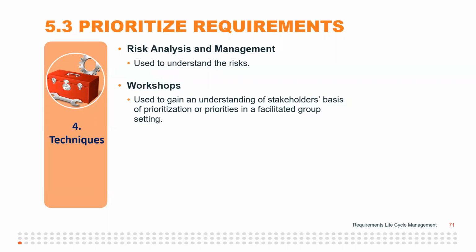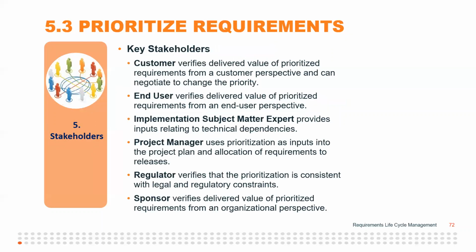or a particular requirement. Okay, so the key stakeholders for prioritizing requirements are the customer, the end user, the implementation SME, who will tell you about technical dependencies between various requirements, and then the project manager, who uses the prioritization as inputs into the project plan, like the schedule, and also the allocation of requirements to the various releases.